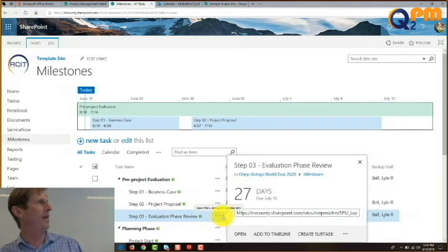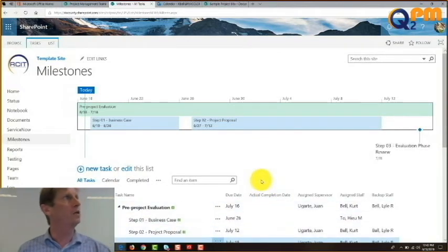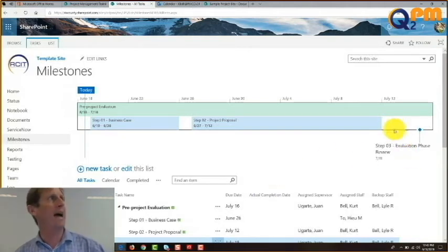and we'll click on save, and then we're going to go ahead and add that, and it should plug in nicely. It should fit in like a nice jigsaw puzzle. Okay, good. So actually, I misspoke. Why does that appear like that instead of like the jigsaw puzzle that I thought it would be? This is correct, I was wrong. What is unique about this particular item versus these items? It's only one day. So it appears as a milestone rather than a task, right? And there we go. And that's on the 15th, and it takes us to the 16th.